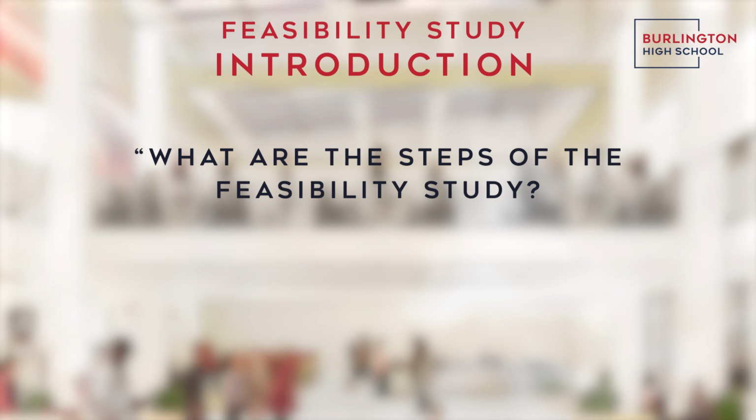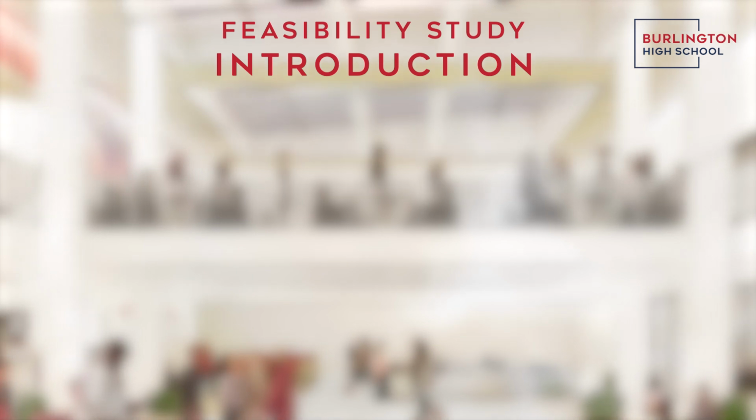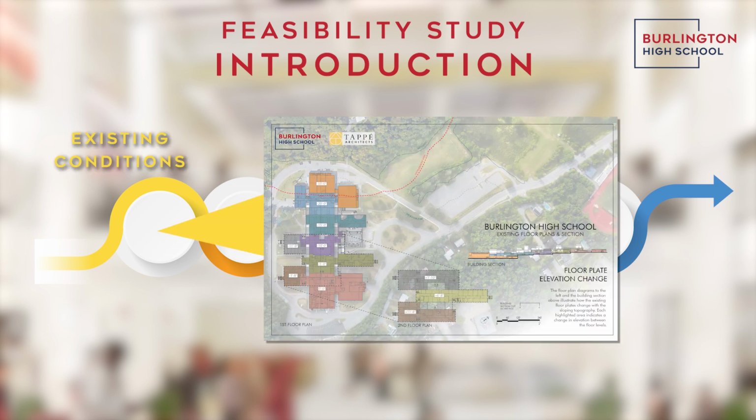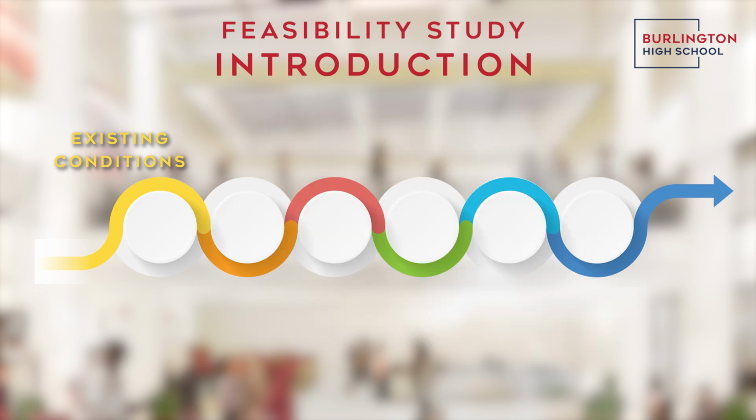So what are the steps of the feasibility study? Here's a roadmap to get a sense of where the project is currently, what's coming up, and how you can be informed and get involved. The first step is gathering existing conditions. This provides the design team with accurate measurements, systems performance, and a baseline of what needs replacing and what areas can be renovated or repurposed.